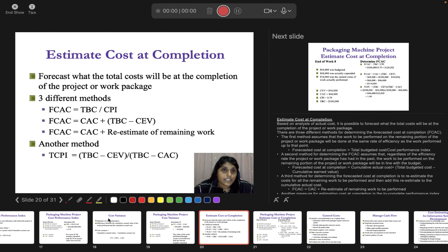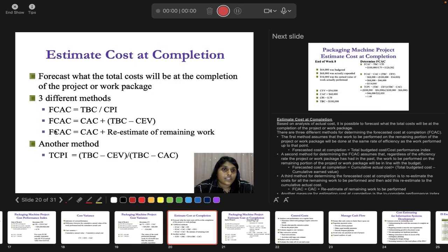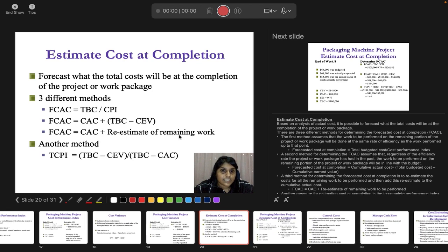Because you have completed 54%, your remaining work is 46%. So here in your third approach, FCAC equals CAC plus re-estimate, you are going to plus your CAC. Your CAC is 68,000, and then you are going to plus it with your 46,000.